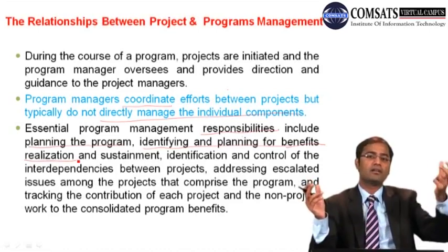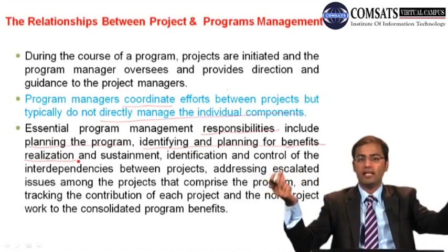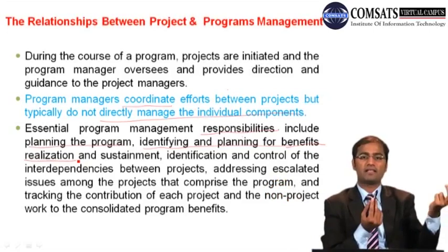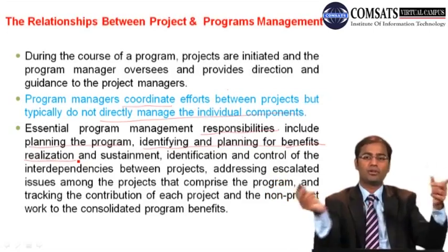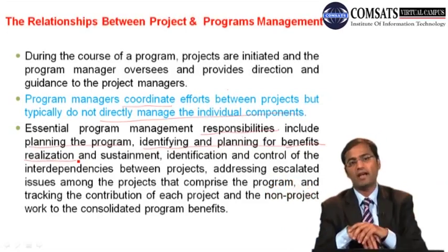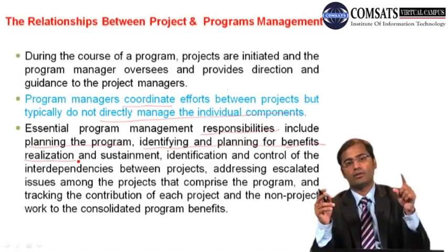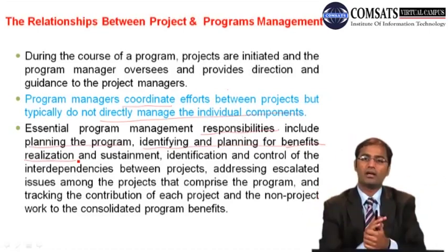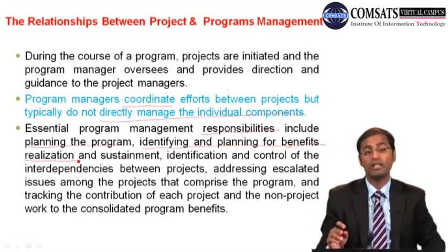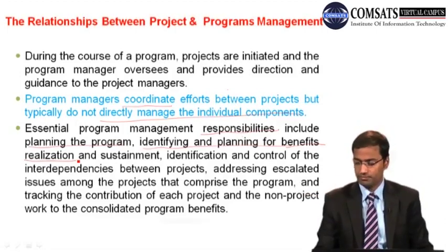But if one project has 3 members, and the other project has 4 members, and both of them are in need of like an X team member, so both projects are demanding X member. In that case, we have one dependency of resource sharing among these 2 projects. So we need to identify such relationships between projects.